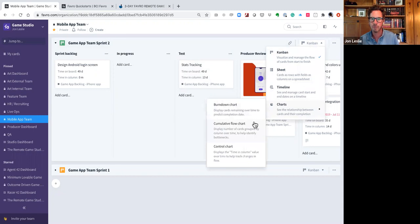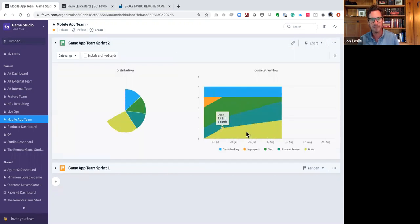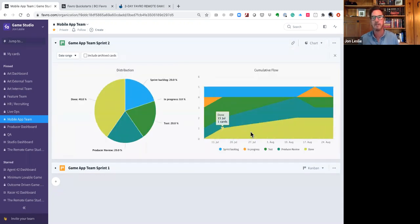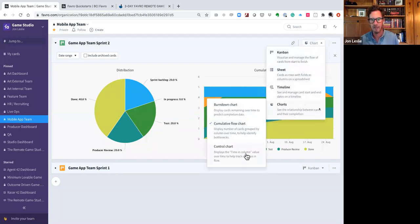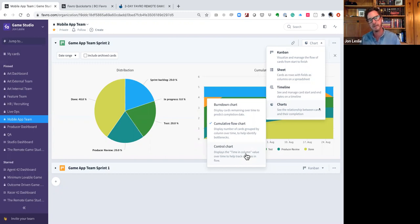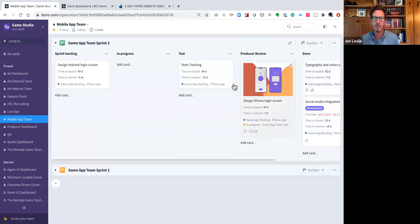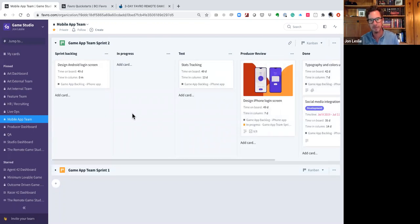Built into each Favreau board are burndown charts, cumulative flow diagrams — an excellent way of tracking flow of value over time — and even control charts. If you're working in a Kanban flow-based way, control charts let you track average lead times and average cycle times: another great way to see if you're improving as a team in terms of value flow, or staying the same or getting worse. These are easy ways built into the tool to track flow just by working as you normally would.